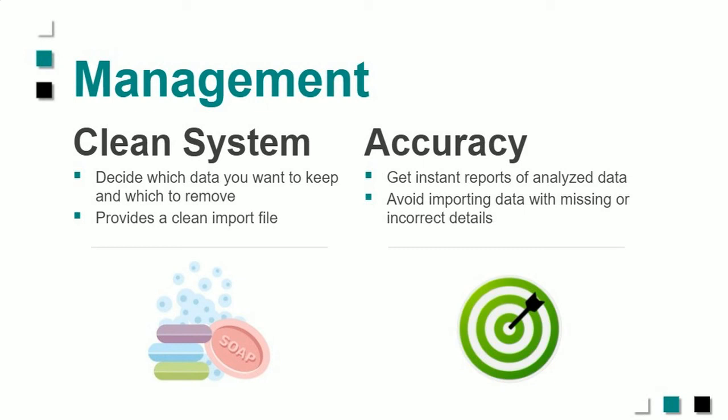Another case study, a newer one that we're exploring with a few clients, is for contractors. When you build a schedule, you don't necessarily want to give all the pieces to the client, because there might be overhead and profit that you're doing in P6 and things like that. You can scrub those fields out. So this could be a pre-scrub kind of use case, and then you give them the scrubbed file, okay?